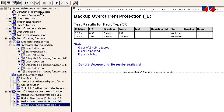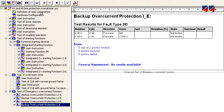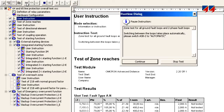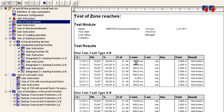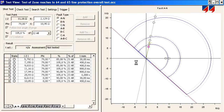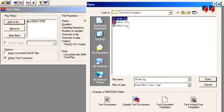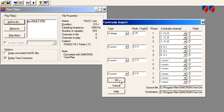After running such a test sequence, the software will produce an overall report including results for all the functions tested. Once the test is complete, the system retains all of the required data, which allows its repetition by reloading and replaying it. This enables maintenance testing, which may take place several years after the initial commissioning, to be greatly simplified.